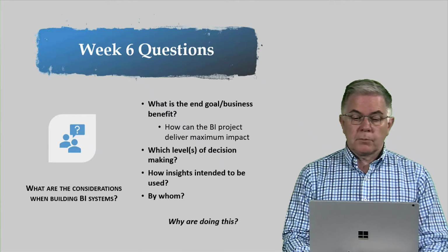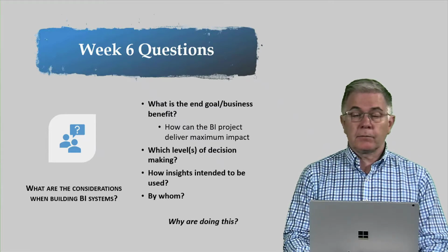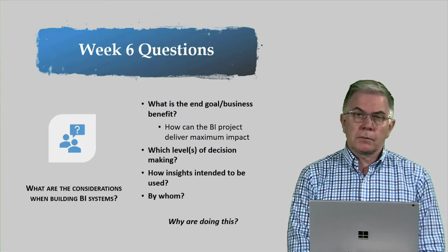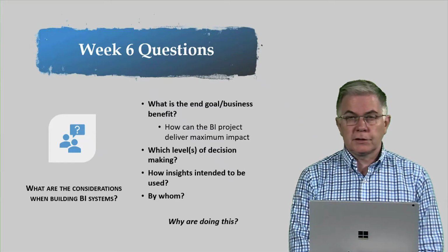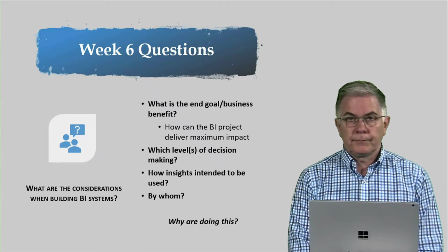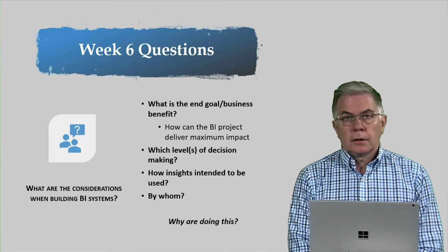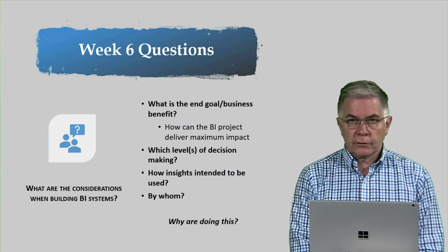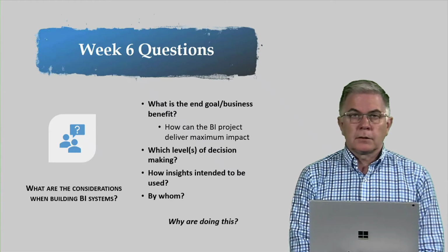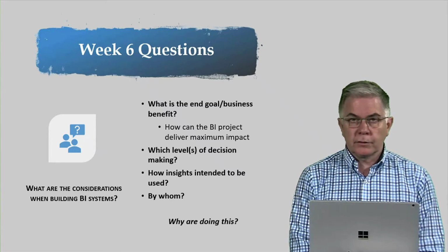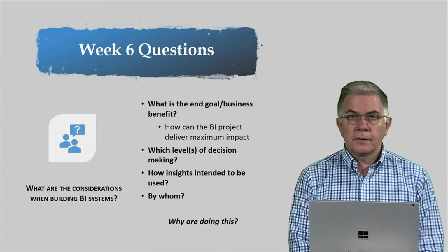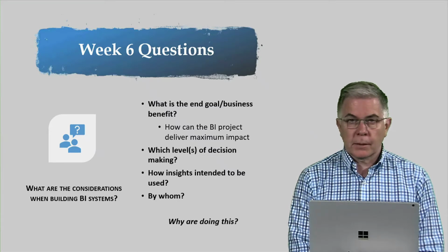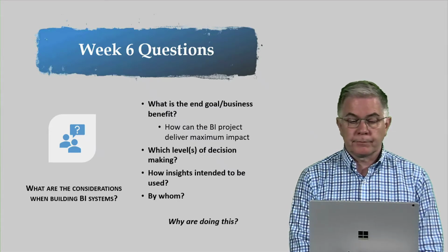So how can the BI project deliver maximum impact? This may even come from being able to deliver a set of dashboards a couple of months earlier than originally planned, because they're going to be used for some crucial strategic decision in the organisation. That could be as simple as, let's focus on the front end first, just do updates using Excel as a source or a standalone database, so that the end users can make use of them when that decision process comes along, and then later on get some feedback and automate the update of data. That's an example of what I mean by maximum business benefit.